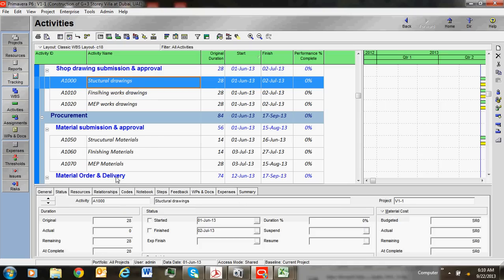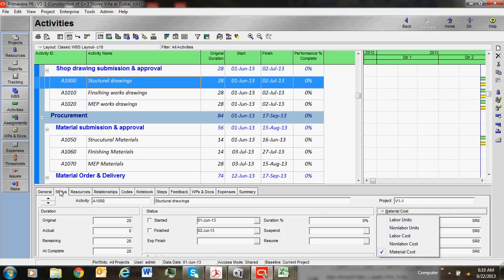Method two - go to Status and you can see we have different cost types: labor cost, non-labor cost, and material cost. For a project, if you know all three, you can get the budget cost. Labor cost is paid to laborers, non-labor cost is for machinery like equipment - crane, hoist, excavator, truck, etc. Material cost is for steel, sand, cement, wood. So we have three types of cost.